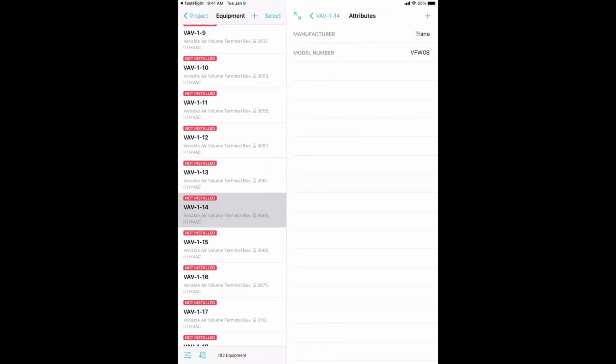This is really beneficial in terms of the overall life cycle of your project, because what it means is at the end of the project, you can export your list of equipment, and all of this data that you recorded during the course of completing your checklist is going to be there as part of that equipment data. Just going to be additional columns of data in that equipment export in a super usable form that you can hand off to the building owner, operations team, to anyone else that might need that information at the conclusion of the project.